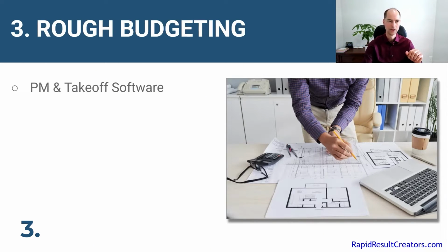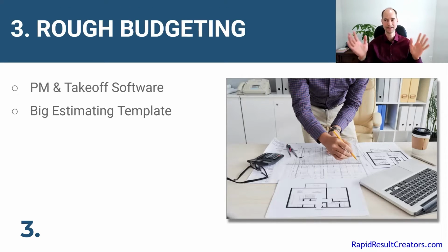PlanSwift is really solid as well. So you need to get your proper software stack in place. You want to then set up a big estimating template. Your template should be pretty much as big as you can make it, because it's a lot easier deleting things out of an estimate than it is to add them in.